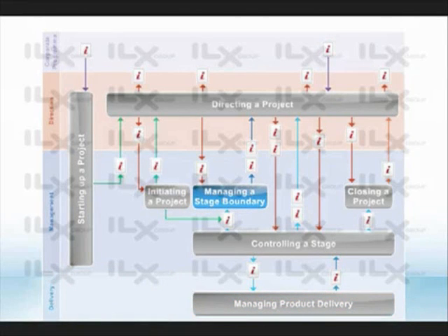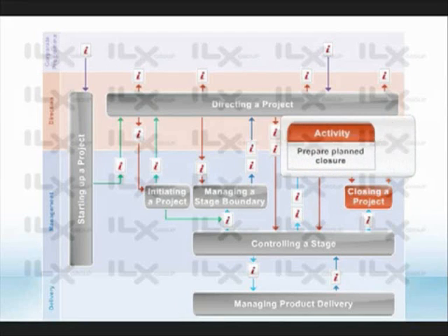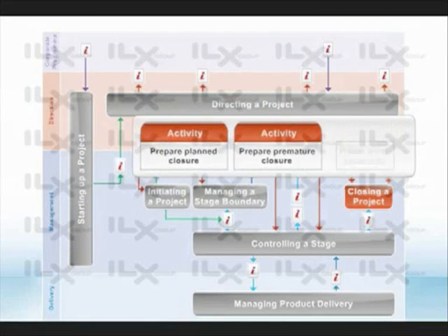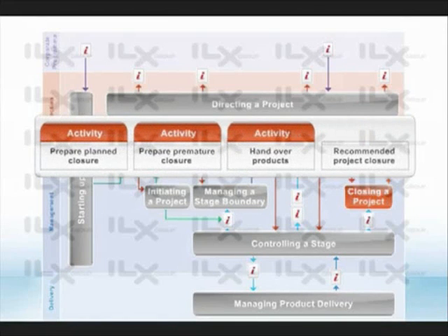Managing a stage boundary remains largely unchanged, whereas the closing a project process has seen significant change. Only one activity from the previous publication remains here. New activities include prepare planned closure, prepare premature closure, handover products and recommend project closure.